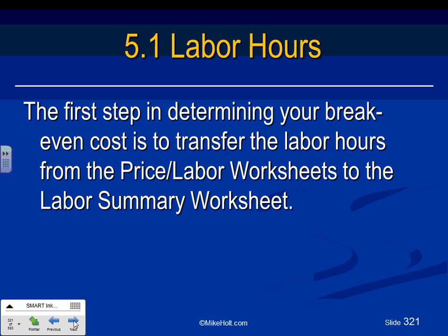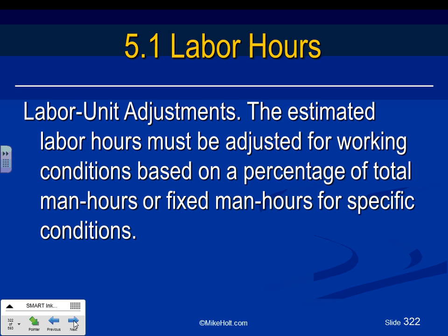Labor hours. This is where I want you guys to pay a little bit of attention now. Up to the bid summary, if you remember, we have a list of all the prices and a list of the labor hours. Now we're going to assign a labor dollar to the labor hour. So we have the break even, then we have our labor hours. We take them from the price and laboring sheet, guys, into the labor work summary. If you remember the Excel sheet that I did with you, McCormick will do the same thing, guys.